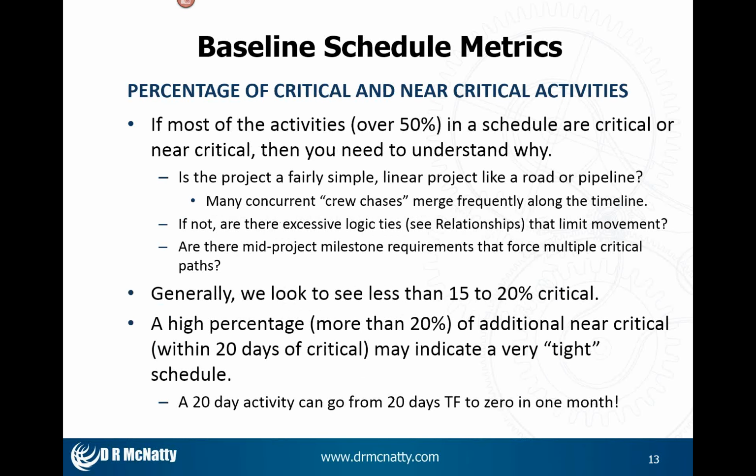Percentage of critical and near critical activities. If over half the activities in the schedule are critical or near critical, then you might want to take the time to understand why. Some types of projects, especially, my background is heavy highway and underground utility, linear projects where I've got multiple crews chasing one another down the alignment of a project, and the crew work might merge frequently, come together to maybe go to a next stage or a next phase of the work. And in those cases, you tend to have a lot more critical activities than I might on, let's say, a general building project.